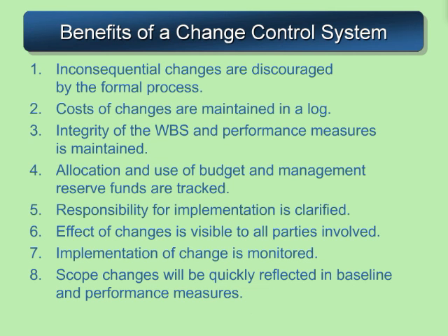There are some significant benefits to having a process in place to allow for changes. The biggest one is not allowing a lot of informal changes, so we have to go through a formal process for those changes. We can track the costs. We can see the impact on the WBS and any performance measures. We can then manage the change through the use of budgeting and adding resources as needed.